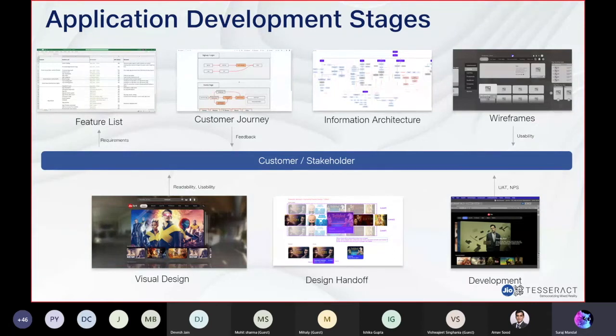How exactly we do this is we start by listing down all the requirements, and what we create is a feature list. This can be supplemented with things like a user storyboard or a PRD document, but we start from collecting what requirements are there and what requirements there can be. Based on that, we club some requirements on similarities and functionalities, and what flows into a different kind of requirement or steps together.